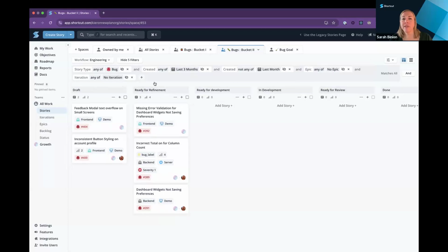And I try to go with my team and ask, what is the entrance criteria and the exit criteria for a ticket to enter draft and what it takes to leave draft. I think if you can get your team to have buy-in on what it is, people will understand the intention of each column. The digital ink is not dry. Feel free to delete a workflow state if it doesn't make sense for your team. There's no right or wrong answer. It's how your team moves clearly.